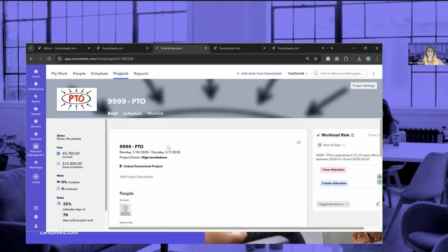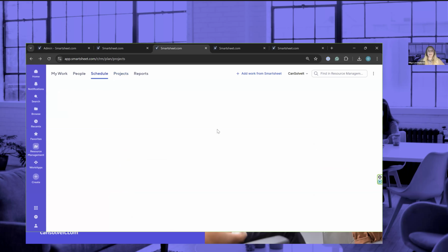It helps me to plan my capacity for my team and also see it in Smartsheet. I will show you the difference, right? With this project, with this schedule, and without this, because we know that people are getting sick. People need to have rest. We have some training, some conferences, business trips, and if we don't count this and plan that that person will be there, it's just not good planning. Just again guesswork.